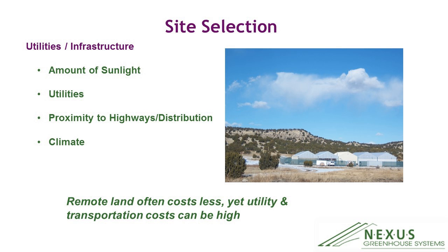That's absolutely true. And I know you've mentioned several times, is there a basic rule of thumb that you use for how much water you're looking for at a site? Not that you'll go through this amount of water, but it's good to plan for between a third and a half a gallon per square foot of cultivation per day.